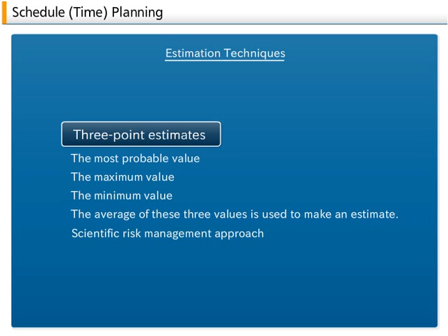One takes the simple average of these three previously estimated values. The other multiplies each of these three values by a fixed coefficient and then takes the weighted average of those values. Using this method, one can calculate the number of man-hours necessary to complete work by a single individual, then use this estimate to calculate the total work hours for an entire project team.